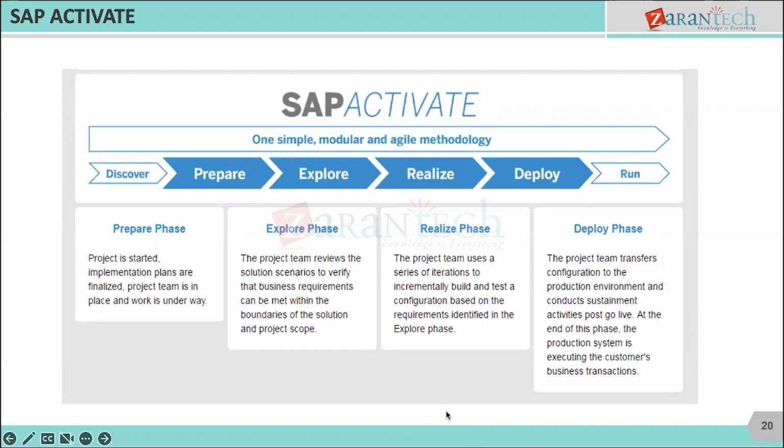Then the consultants will start getting involved in the project from the second phase, the explore phase, which is basically the requirement gathering phase. Here we get an opportunity to meet the business and the process owners, and understand their existing processes, existing systems, and the challenges they are facing. We learn what they are looking for from SuccessFactors, and how we can bridge the gaps they have in the previous solutions or processes. Understanding the as-is process and building up the new SuccessFactors system requirements is what we gather in the explore phase. Simply, it is called requirement gathering.